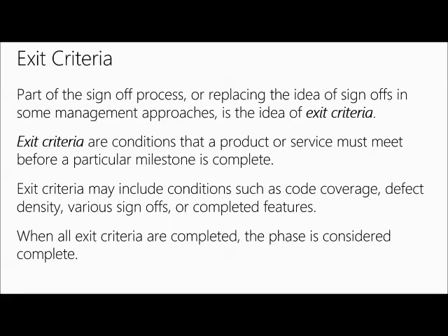Exit criteria. Everybody loves exit criteria because it kind of gives them what they need to do to get through that phase or that iteration. You want to talk a little bit about this, Eric? Right. Exit criteria is the criteria that you've set to exit from one phase to the next. So the exit criteria for the stabilization many times will be things like no priority 1 bugs that are open. So all the priority 1 bugs have to be resolved and closed out.